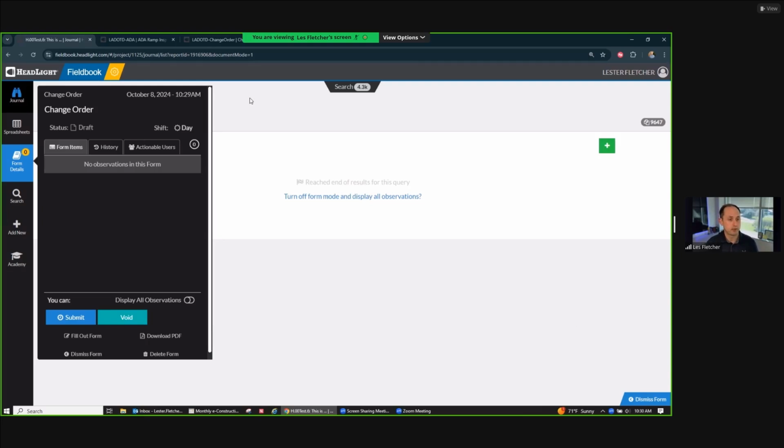So it's like if you see something and think, I think that's going to be a change order, you can immediately create this form and start adding images, right? And then kind of submit it to the PE for review. And if it's something that's not a merit, the PE can easily void that form and just not worry about it. But if the PE says, oh yeah, I see what you're saying, that's definitely going to be a change order, they could go ahead, and it gives them a head start in the documentation they need for getting that change order through the list. So something that's new. We have not tried that before at DOTD, but I think it's something that's interesting, and I think it might be helpful for the PEs out there.